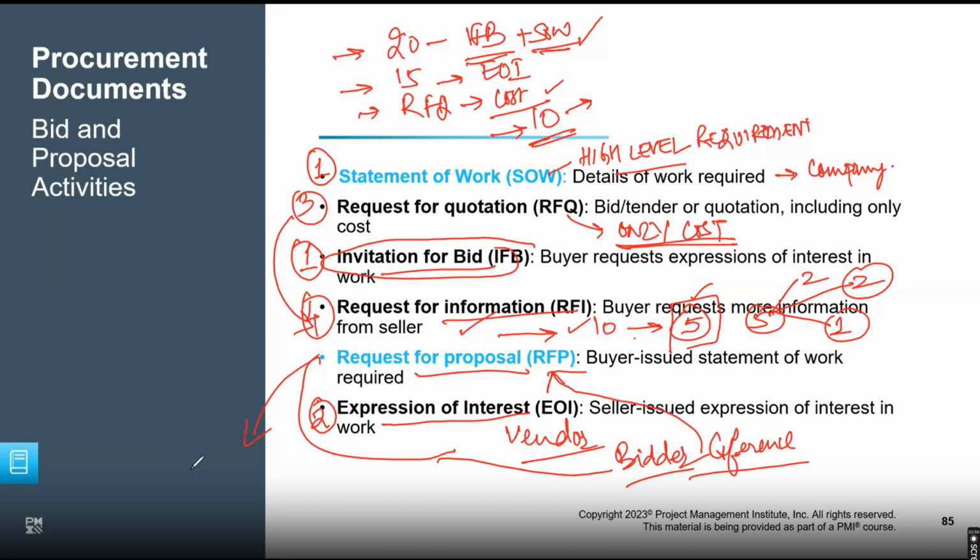With those vendors, I will sign an MOU, a Memorandum of Understanding, which is not a legal document right now, because we don't need them right now. When we need them, we'll sign the contract. Right now we have agreed on our terms, the money and the roles. You know what you have to do, and I know how much I have to pay. Basically, the understanding has been developed, so we at least get it documented and both understandings are clear.